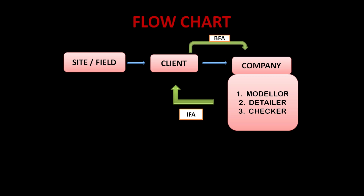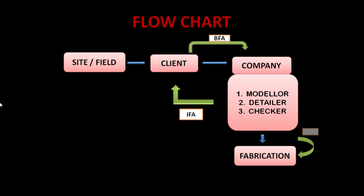Once the client approves, for example in Revision B, they send back a BFA stating everything is correct and to proceed with fabrication. The drawings are then sent to fabrication — this process is called IFF, Issue For Fabrication. When sending for the first time, mark it as Revision 0. During fabrication, the fabricator may not understand certain aspects and will send the drawings back, generating revisions. The second time it is Revision 1, then Revision 2, Revision 3, and so on.